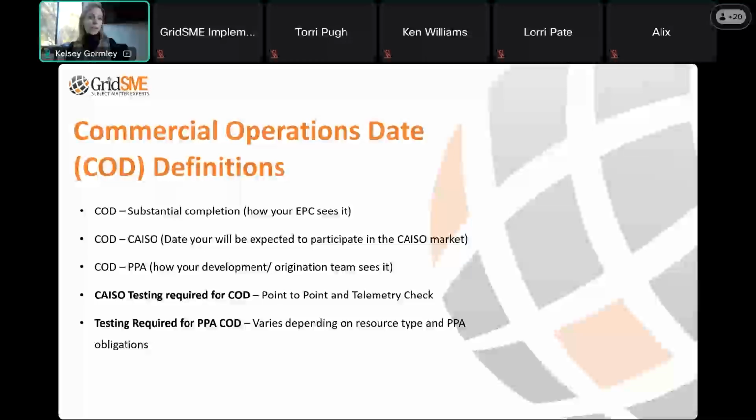We also get questions about what testing is required for meeting PPA obligations. That testing can happen after you've achieved commercial operations with CAISO. That is ancillary services testing typically. There is a testing protocol that your scheduling coordinator will help you to schedule to get that testing completed.